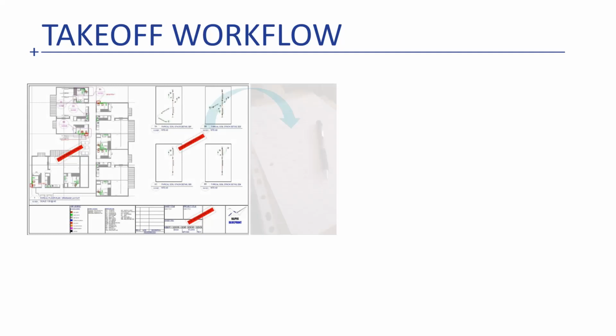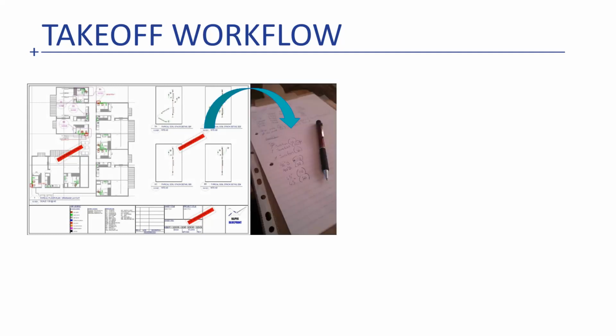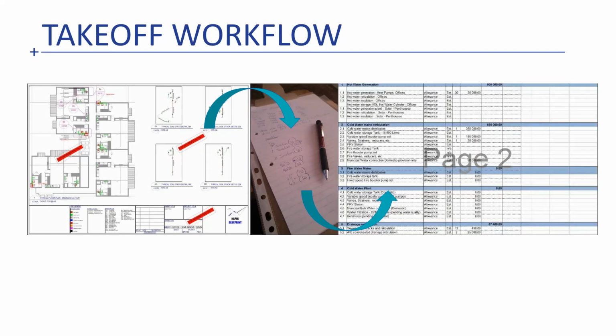The second stage is breaking down the information in a manual takeoff process. The goal is to quantify off of the design. And then finally, this leads us into our third stage, where we consolidate all this information into a legible BOQ schedule.